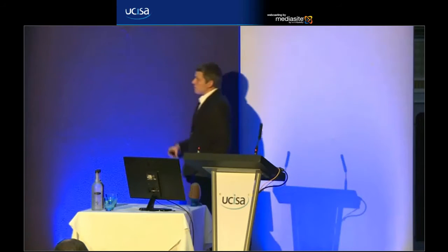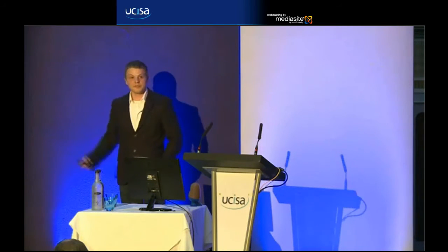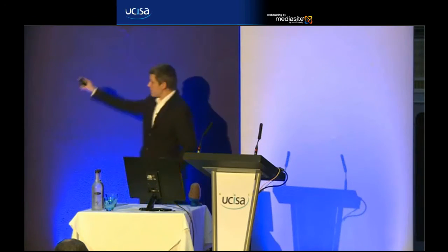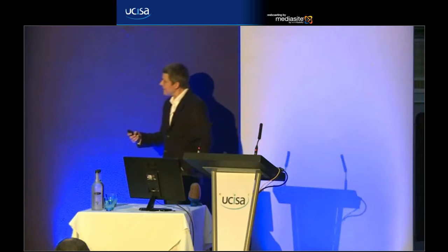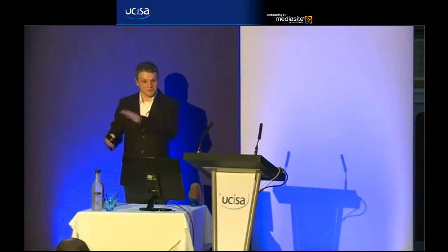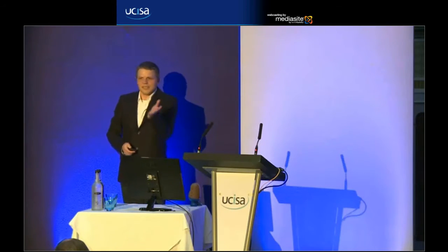So we have an iterative process. We fixed on a 3-week schedule. This is the one that we use where we have a development phase. Because we're doing programming, we then have a freeze point where we don't start any new work. We have a finish up phase where we then allow the developers to finish the sections that they're doing. Tag and release, this is all development stuff.